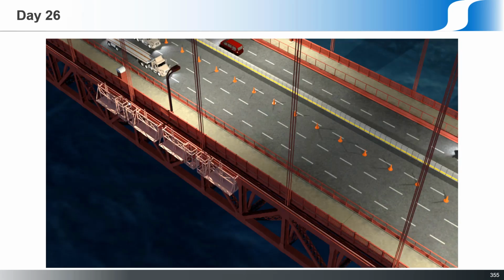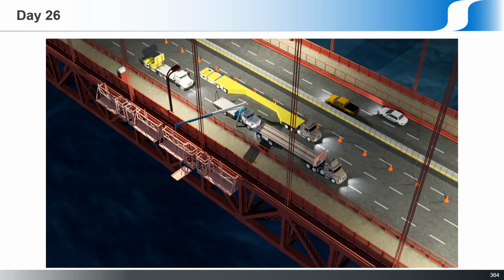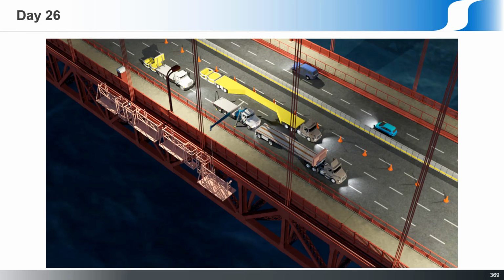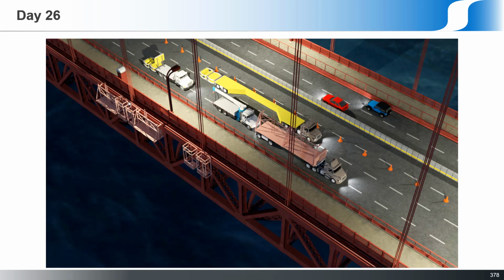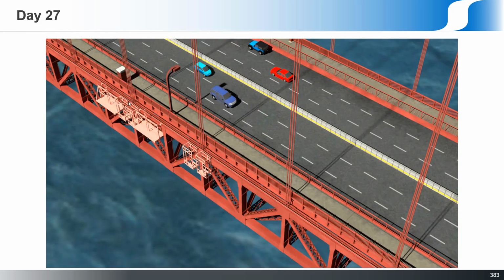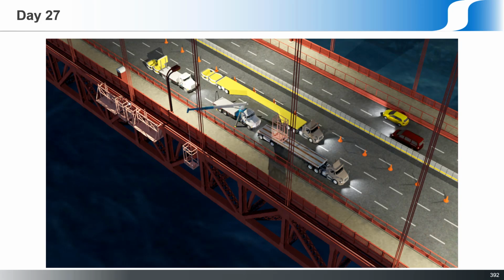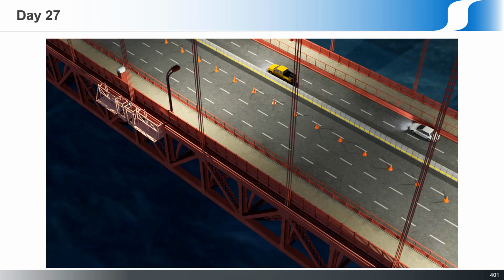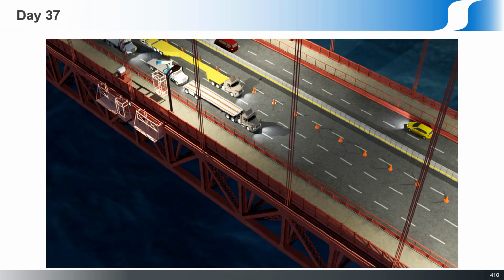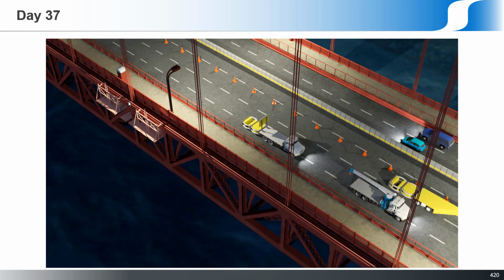The goal here was to demonstrate that the changes made by the owner in insisting on these heavier platforms caused this immense amount of manual labor that took nighttime work only, required lots more men, lots more trucks, lots more cranes, and a huge number of days to get this thing done. So we'll get through this sequence so that we can see that this span of